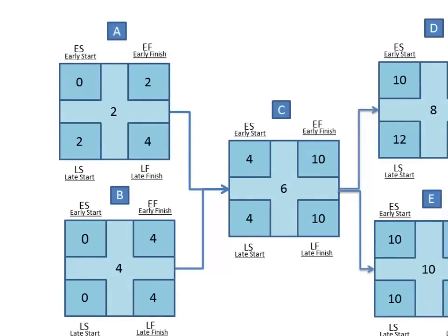We now know that task A has two days of float. So, let me ask you this. Is task A on the critical path? No, because only tasks with zero float are on the critical path. A float of two days means task A can be delayed by up to two days without delaying the project completion date.